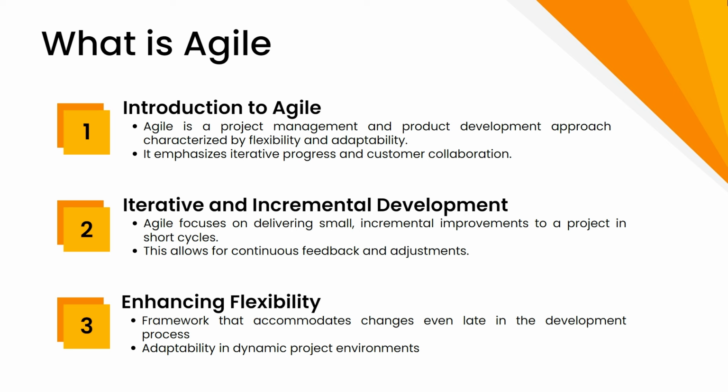What is quite popular about Agile is iterative and incremental development. Iterative means we will be talking about a smaller duration, which can be 1 week, 2 weeks, 3 weeks, or 4 weeks, whatever it is. If you decide while starting the project on 2 weeks of iteration, then your iteration duration is fixed as 2 weeks or 3 weeks. Mostly, it is not recommended to change the iteration. Whatever you decide while starting the project should be constant throughout the project life cycle.